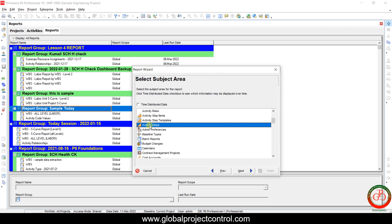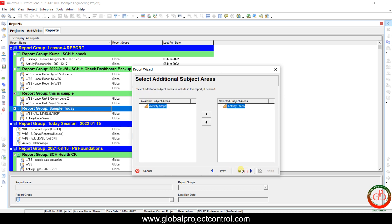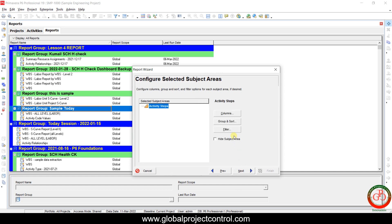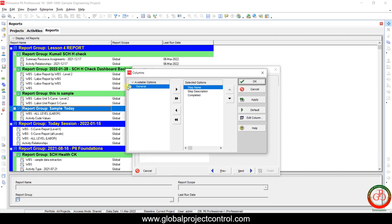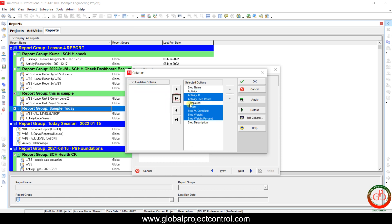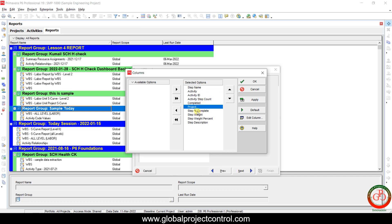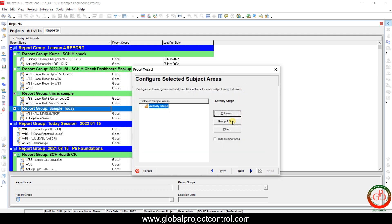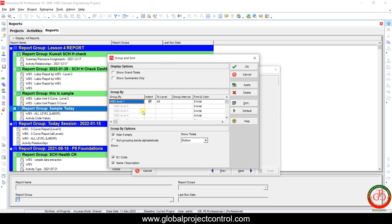The third type is Activity Steps. If you proceed to create a report using Activity Steps, you have the opportunity to find which activities are connected to which items on the project, because it is completely connected to the Activity ID, steps, and full descriptions. Then, under Group and Sort, you can create a report based on WBS.